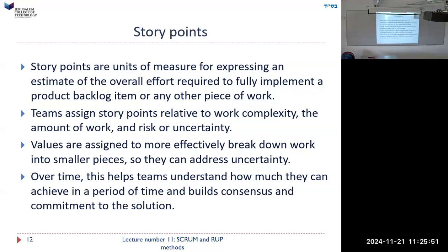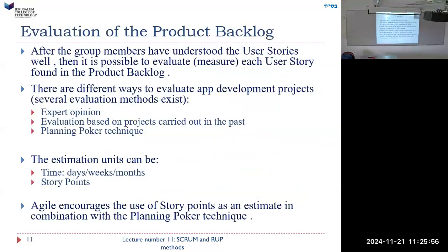And it doesn't say anything about time. That's why we said before that it can be estimated in time or in story points. They're 2 different methods. Story points is just saying, if that one was 1, then this one is such and such. It's like 1g is the gravitational force of the Earth. So we measure all planets by how many g's they are. What's the unit? The unit is however much gravity there is on Earth. It's not an absolute measurement, it's relative to Earth.